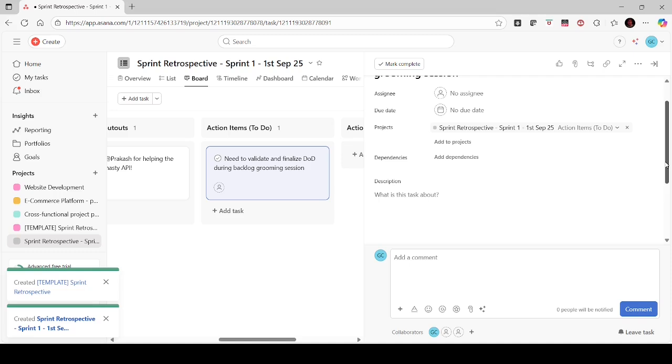Because during sprint planning it will be easier for us to collect the set of items which are completely ready to start work. So instead of going through the backlog, if Ready for Sprint is another bucket, from there we shall just pick up the items based on the team's capacity.